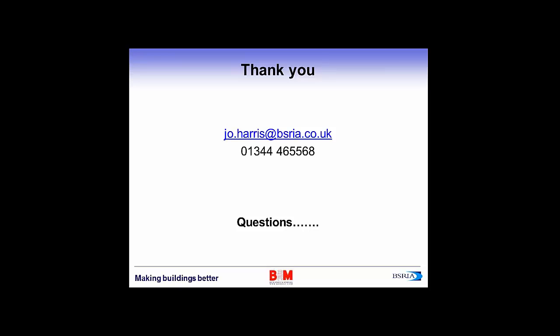Fantastic, thank you. How could BIM work for an existing estate rather than as part of a new build construction? Will the cost of implementing onto an existing property be prohibitive? On existing estates, it's again going back to that triangle, thinking about getting all your information requirements defined, starting to develop your own asset information model. So a place where you only put validated current data so that you can start using that data to make better decisions. And then you can add to that as you go into a BIM environment with a BIM project. So if you think about that very complicated diagram and the 1192 part 3, existing estates can pick that up and start the journey.